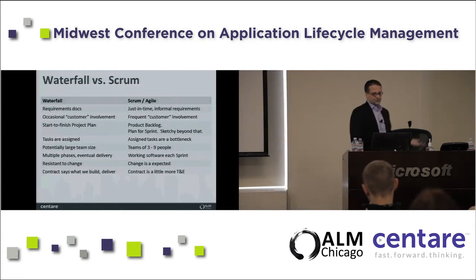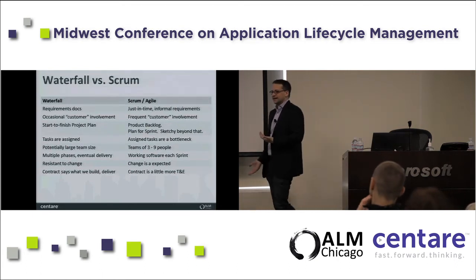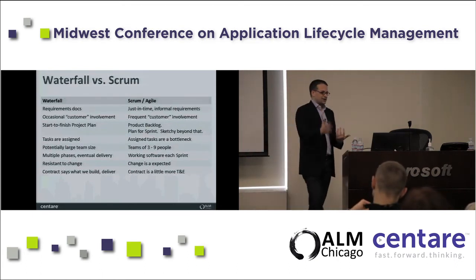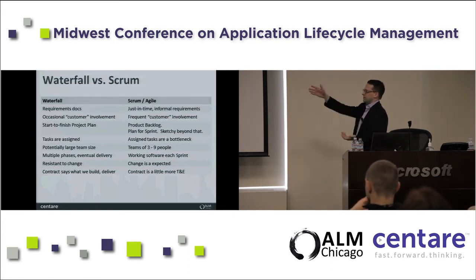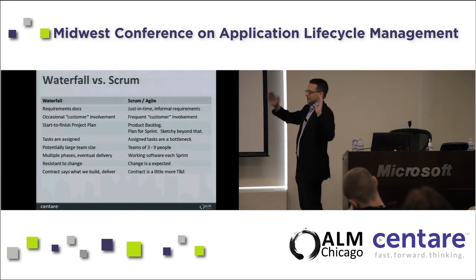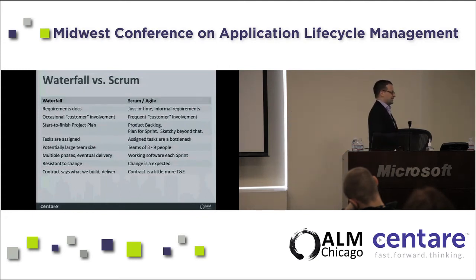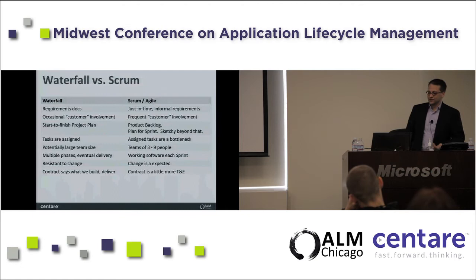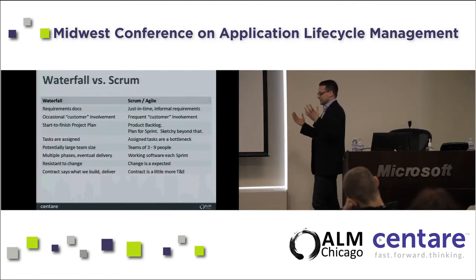In Scrum Agile, we're doing a product backlog, and then we plan basically for the next 30 days for the sprint that we're in, and we only have the fuzziest idea of what we're going to do beyond that. And pretty much anything beyond that sprint boundary is completely up for change. Whereas in Waterfall, we kind of say, here's all the things we want to do. We're going to do them in this order, and we're going to do them on these dates. Sure you are.